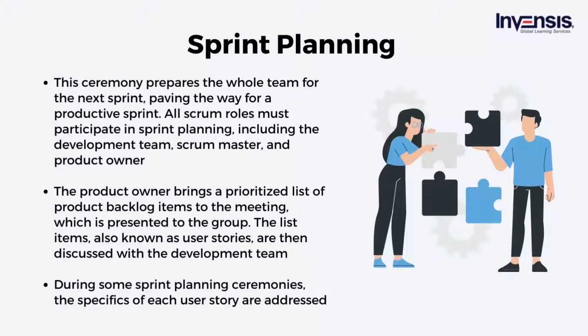During some sprint planning ceremonies, the specifics of each user story will be addressed. This will ensure that all participants understand the scope of the activity. However, some will have a separate gathering or ceremony for story refinement. This reduces the length of the actual sprint planning ceremony and restricts its focus to the user stories that will be addressed in the future sprint. Then, the team may plan their sprint using a Scrum board.